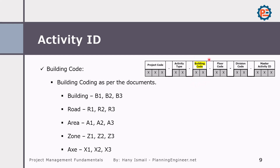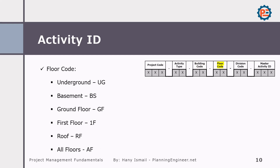It is very beneficial to have a building or area code. Floor code is also very useful because when you are looking at any activity, you will recognize which floor we are talking about — for example, underground as UG, basement as BS, ground floor as GF, first floor as 1F, and so on. This is one of the comments I receive from clients doing Zen planning and project management services — they say this is a very nice numbering system.